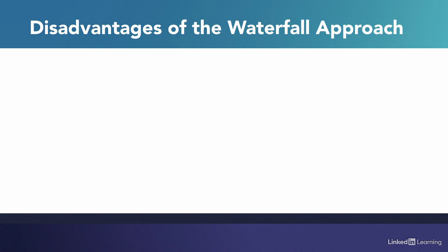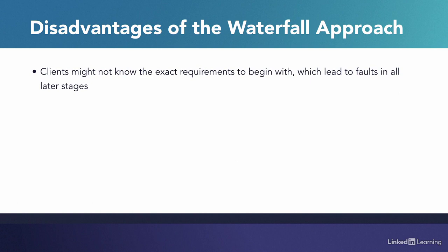Let's talk about them. The first disadvantage is that the user might not know exactly the requirements to begin with. If we go back to our data center design example, the service owner typically does not understand the bandwidth requirement until the service is launched. Even then, the requirements will vary greatly from the initial launch to service ramp up to high growth phase and finally to the tail end of the service. The initial requirement estimate is almost always not accurate.